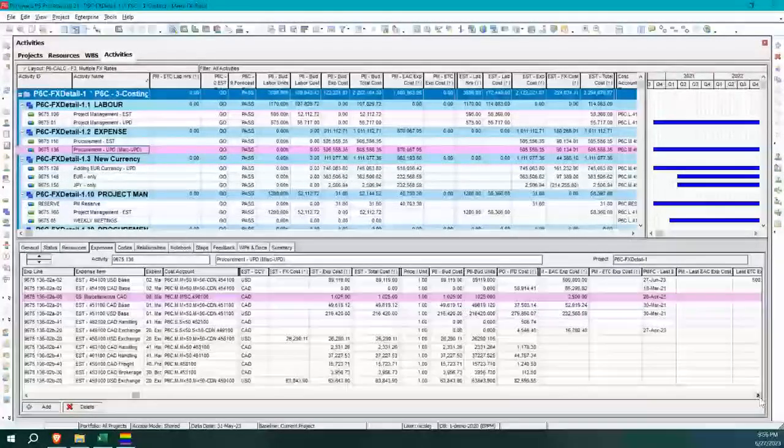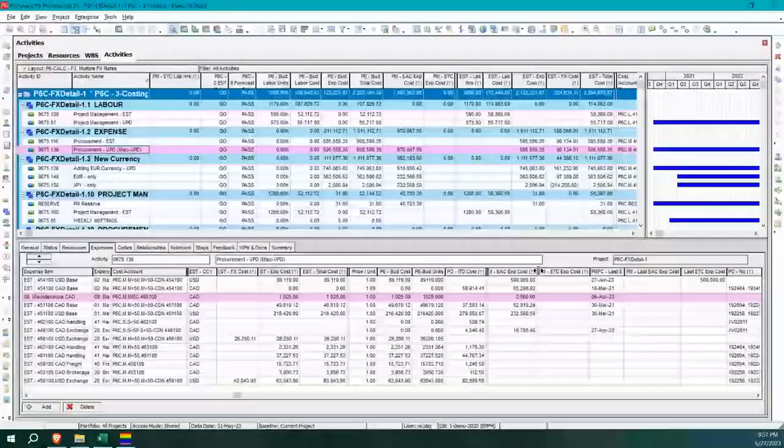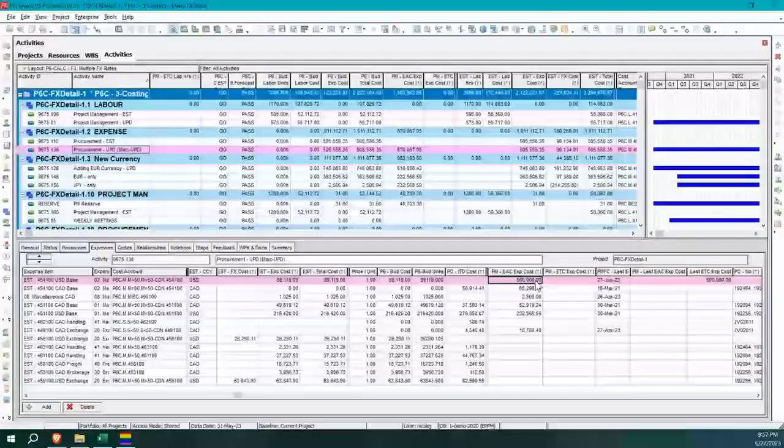So same thing in this scenario, we did a simple way for the project manager to do the updating, okay? Now in this example, I've already done kind of a crazy update. It's way bigger than the budget, but just as an example so you could see it. And by doing that, it's going to do the estimate at completion. We could also update with an estimate to complete, so you can do it either way. The computer will keep track of what the last update was that the PM did. Okay, so this is super handy.